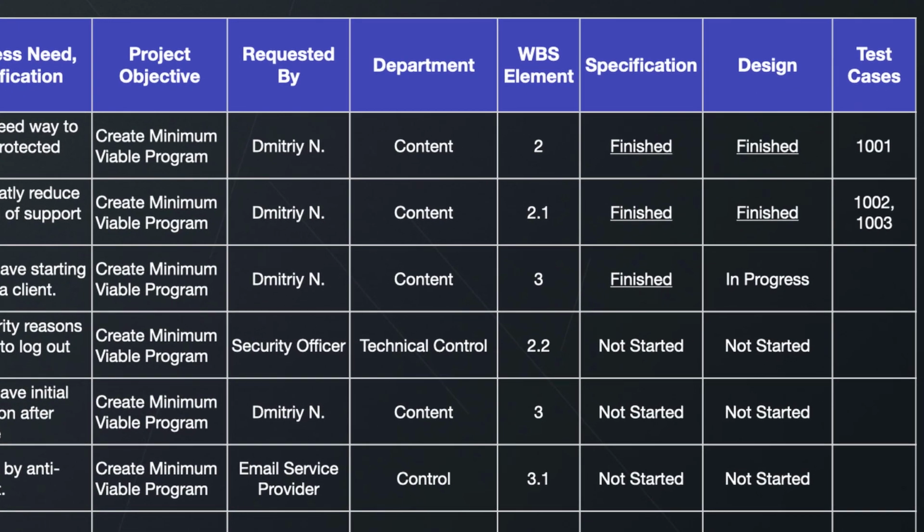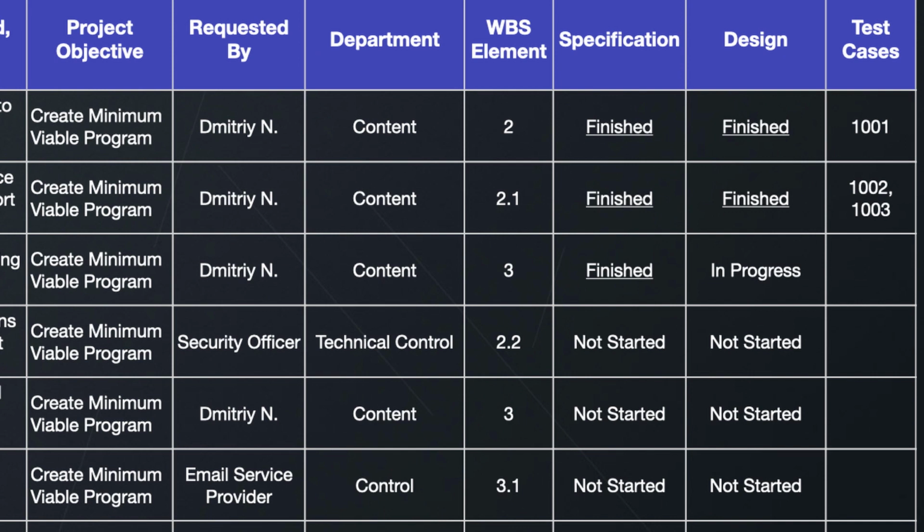Project team will see that a work package or a deliverable includes a specific set of requirements, so they'll need to ensure that the tangible results that they provide correspond to these requirements. And in addition to that, all stakeholders will know when and what deliverable to wait for to see a certain piece of functionality. Having reference to specifications and designs is convenience first of all, but it also shows you the progress on the requirements definition process, whether you are in a good shape to start a project soon or not.